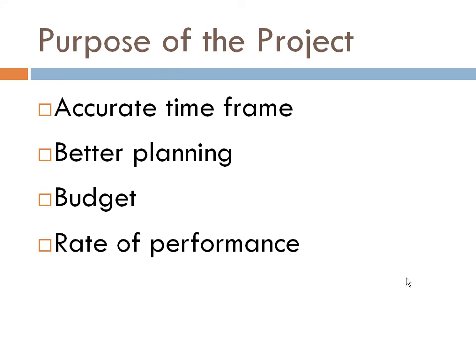This analysis is done through calculating the rate of performance. Rate of performance equals actual duration over planned duration. Only activities in the critical path are included.